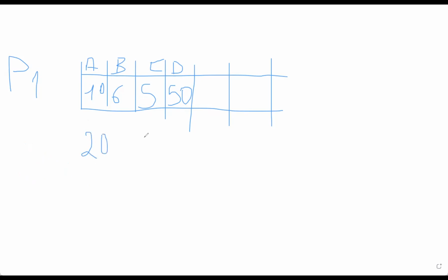What does that tell me? If that's my actual figure, and I planned to only have $10 and I spent 20 instead of 10, what does that tell me? Did I spend more than what I needed to, or did I spend less? More than the baseline. I spent more than the baseline.